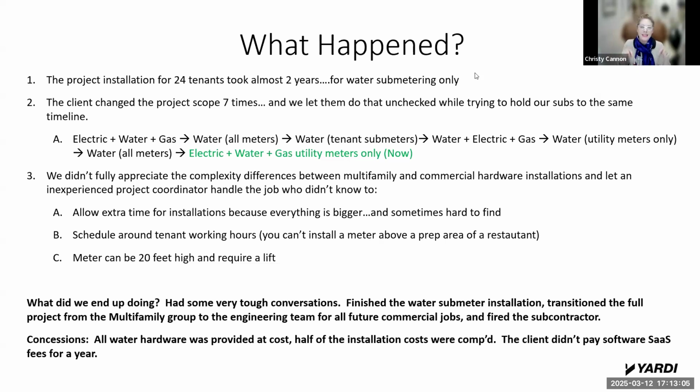And now I just met with this client today. In fact, we're back to electric, water, and gas, but utility meters only. And I had the property staff on, the regional staff on, the corporate on, my boss on, and Maria, who manages the engineering team that's going to support all of this, all of us on as we went through meter by meter. Is this meter part of the scope? Yes or no? Check. It literally took an hour and a half to do that on 25 meters today. It was kind of crazy.